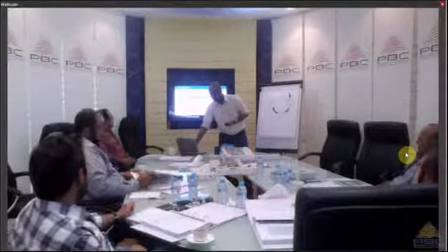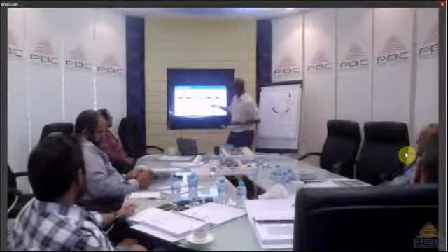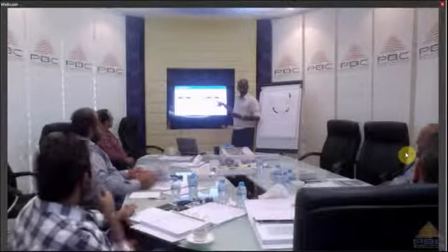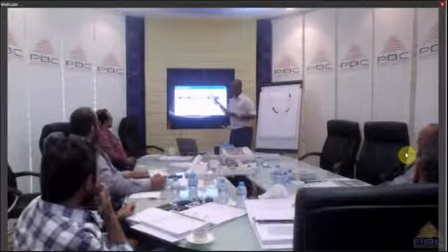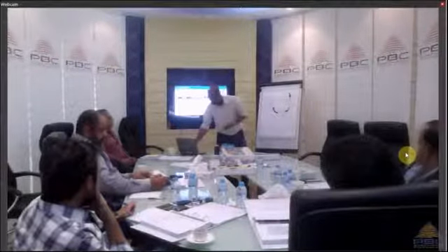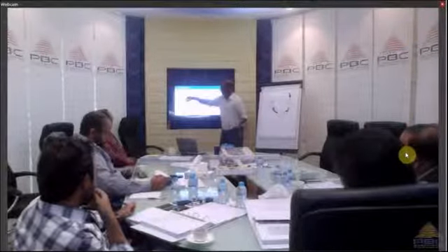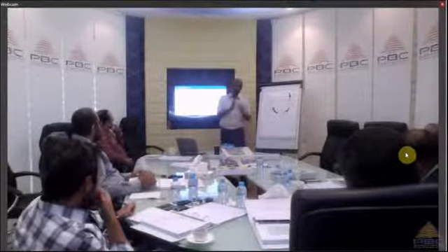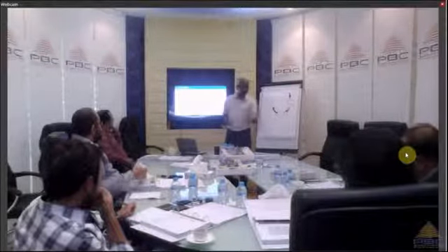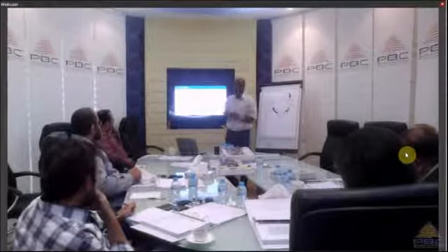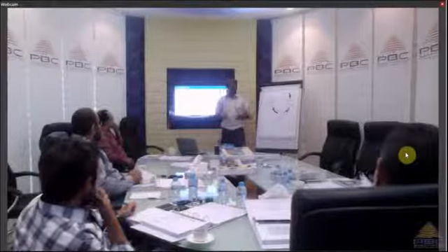So the scope statement here, which we have, is called the project scope statement, which is the output of scope definition, but it's a document. What do we have in that document? All the things I spoke about, or you guys said: the product or the service description. So the physical, the functionality, the requirements, all the details, the acceptance criteria.